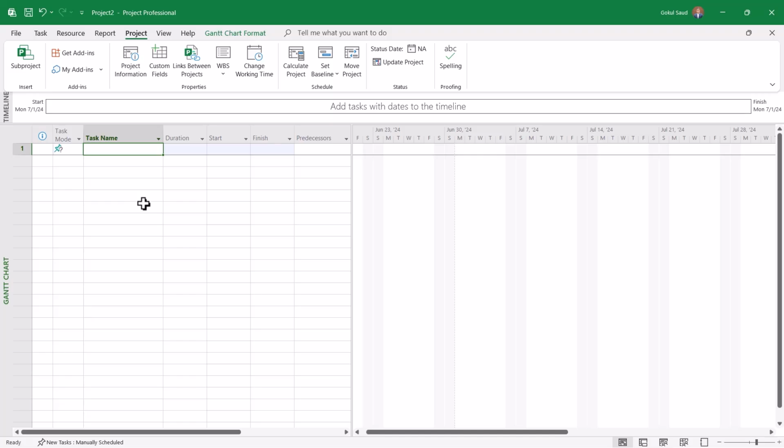Like for example, when you do the excavation, how you will start the stone soiling works. Let's say that when you start the excavation, there is a whole lot of big plot that you are excavating, and one edge of the excavation you have already made. So you have to think whether you will finish the excavation completely and start the stone soiling work, or you can start the stone soiling work once you have excavated a sufficient amount of the land, right? You don't have to finish the entire excavation. You have excavated a certain part and you can start the soiling from there, and the rest the excavator works on, and the stone soiling work also happens parallelly.